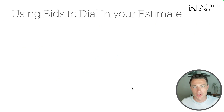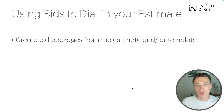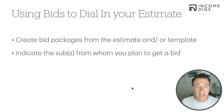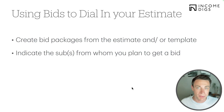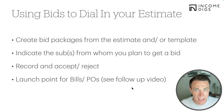Let's get into it. Use bids to dial in your estimate — that's what we're doing here. Almost all of us are going to estimate before we have bids, at least some kind of ballpark, but then we get our subcontractors or suppliers to give us actual hard numbers. Create a bid package from an estimate or template — I love to do it from an estimate. Indicate the subs from whom you plan to get a bid. Not all of them need to be in BuilderTrend. Record and accept or reject any bids, and then it's your launch point for bills and POs. I want to really focus on the actual bid process right now.